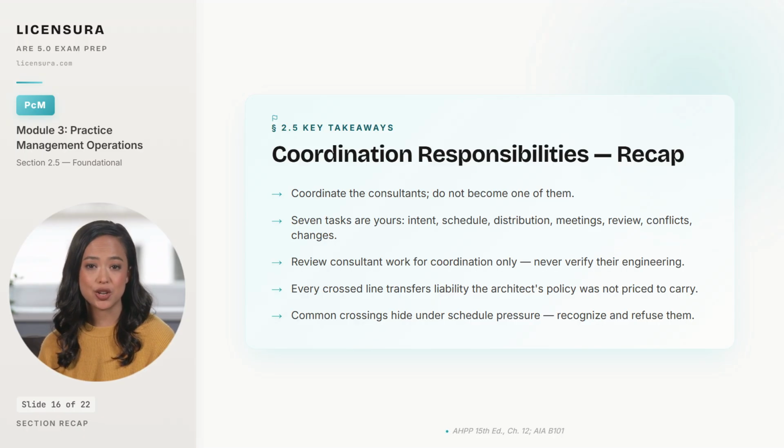First, the architect coordinates consultants but never becomes one of them. And that single sentence is the foundation of every contract document that defines the relationship. Second, 7 tasks belong to the architect on every multidiscipline project: design intent, schedule, information distribution, meeting facilitation, document review for coordination, conflict resolution, and change management.